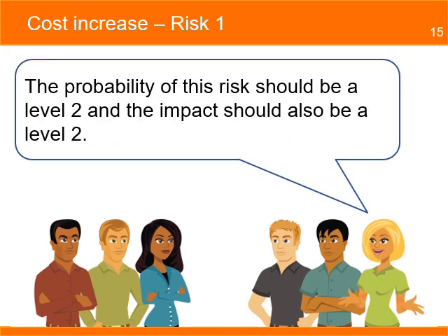The procurement officer reviews the first risk. Cost of electric material might increase due to high market demand. The risk originally had a probability level of 3 and an impact level of 4. The risk index was 12 and the actions identified to mitigate the risk were to purchase from different vendors. Due to her actions, she now believes the residual risk values should be a level 2 for probability and a level 2 for impact.